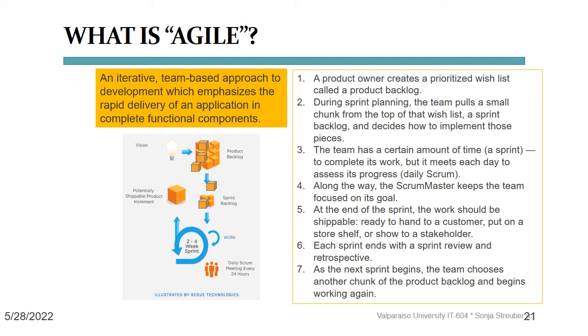And then, every morning, the development team meets in front of a whiteboard in a 15-minute stand-up meeting, in which each member answers 3 questions. What did you do yesterday? What are you going to do today? What help do you need to get your work done successfully? After this Scrum meeting, the developers decide themselves what work they're going to do for the next 24 hours so that they can come back in the next day and report progress.